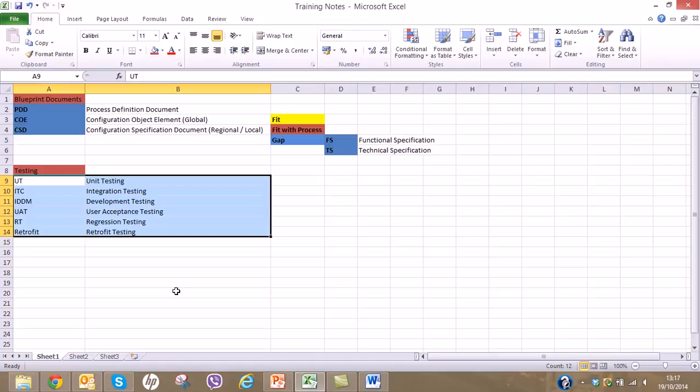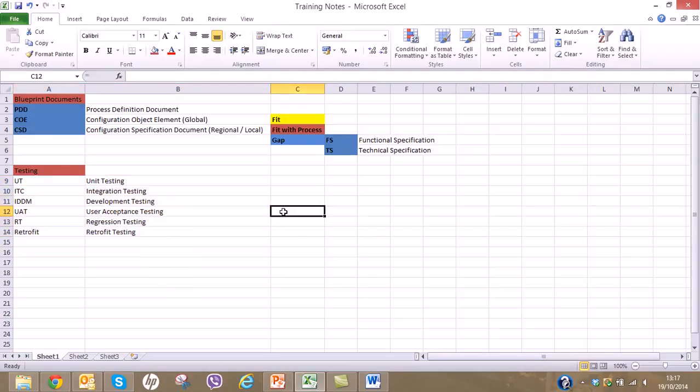The users are sitting and you have to show them how the invoice will be posted into the system. If they are happy and they think that the way SAP is working fulfills the requirement of the business process, then the user acceptance testing is fine. If they are not satisfied, it will be failed. If the user acceptance testing is passed, we call the document UTP.